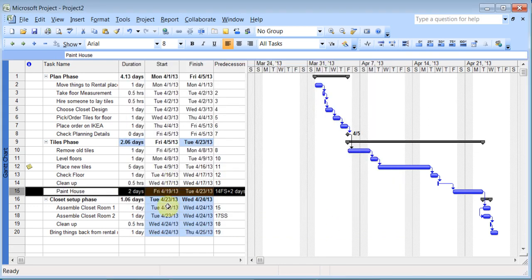So when you do that, you see now these numbers have changed because I've added the lag day. Things got pushed behind, and the Gantt project already adapted, and you can see how the colors in blue show me the changes. This is where some of the things started to change. So that's another option to use whenever you needed it, if certain jobs required some extra space between each other.